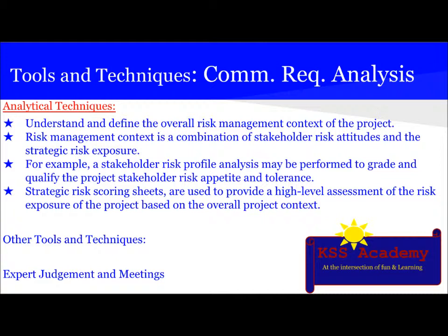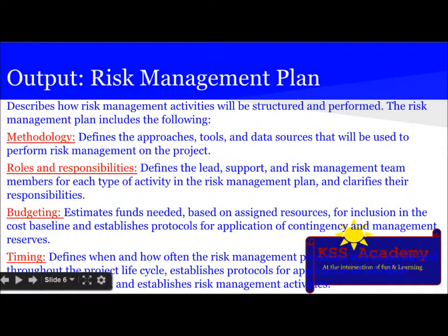Strategic risk scoring sheets are used to provide a high-level assessment of the risk exposure of the project based on the overall project context. The output of the plan risk management is the risk management plan.